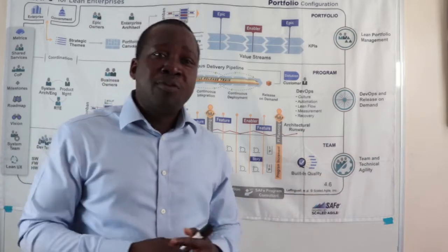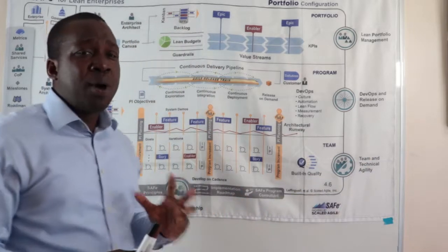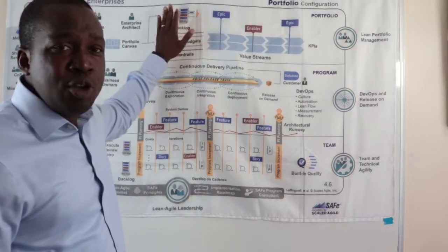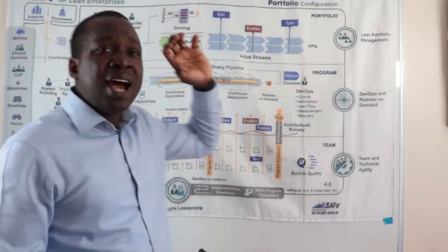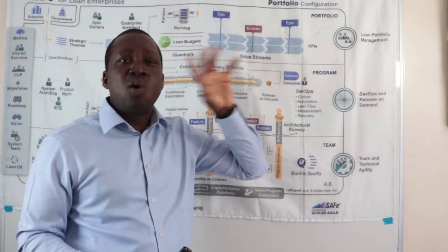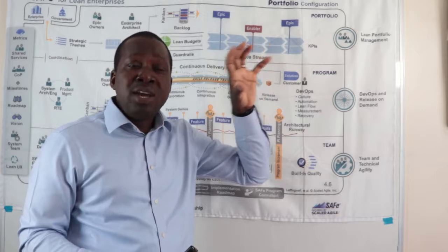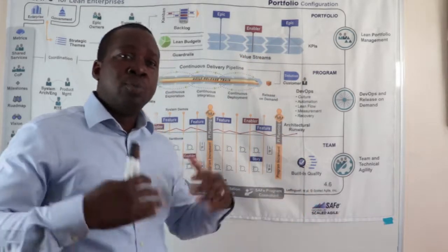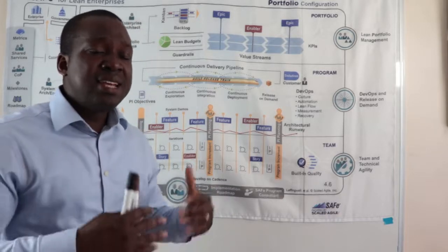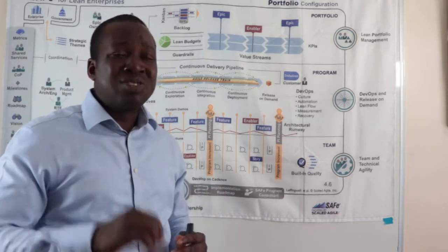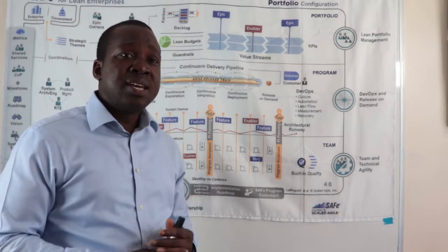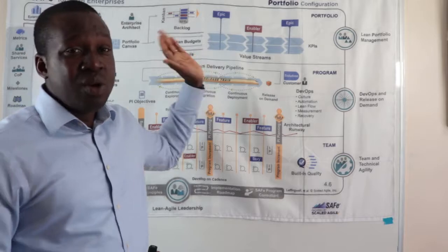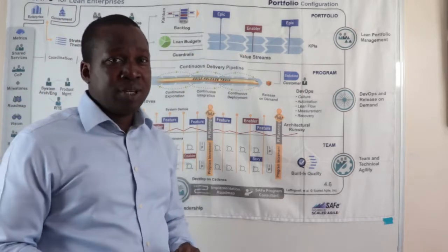If we have a good understanding of our portfolio, we are able to create our portfolio Kanban, which are key projects or key product deliveries or initiatives that should be delivered over a particular period. We're able to assign a budget and then create a lean business case to sign off our initiatives, and once the epic is signed off, it goes into the portfolio for delivery.